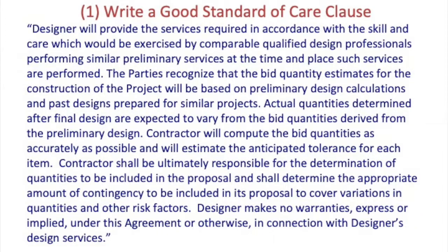So what we have done is prepared a preliminary design standard of care that we have tried to negotiate into all of our teaming agreements. I've explained the problem, and here's the solution. I'm going to just give you this contract clause, and I recommend that you try to negotiate something like this. What it says is that we're only giving you preliminary designs. These are not 100% construction documents. Don't rely on them like they are. We're going to be judged by the standard of care applicable to preliminary design, and the contractor itself is responsible for setting contingencies and doing all the final cost estimating and quality or quantity estimating.